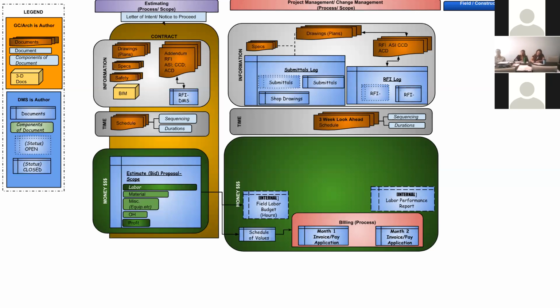And that is an indicator of why we are spending more money than what was allocated. Either the way that it was bid was too aggressive, or something is happening on the project that is not allowing us to build productively. That is the first sign where project management will step in and say, hey, whoa. The first floor, we had 100 hours to build this. We've spent 60 and we are only halfway done. And we're supposed to be 60% done.